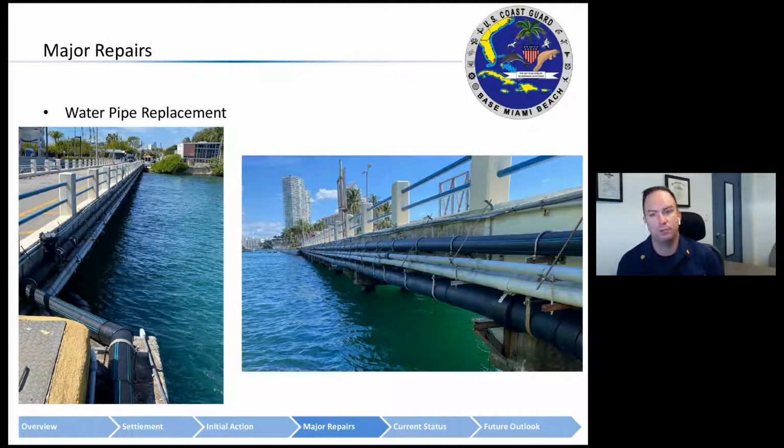For those that aren't familiar, what that means is you have it closed off, you have the new pipe that you're about to put into service. For us, it took 11 gallons. So they pour 11 gallons of bleach into that pipe section, and then they leave it isolated, but they charge it. And then they let that charged water with the 11 gallons sit in there for a specified amount of time. Once that's done, we have to get rid of this super chlorinated water somehow.